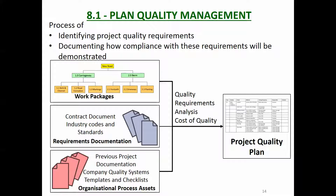The inputs are the work packages — you should be doing this for each work package as part of the quality plan. You've got the requirements documentation: for a construction project that's whatever is in the contract document, particularly the specifications and drawings. For a consultancy project there'd be industry codes, standards, the client brief, and stakeholder requirements. Then you've got your organizational process assets — things like previous project documentation. Often you just grab the last quality plan and adapt it.